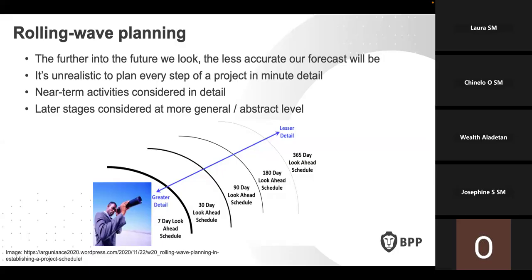So when you have this rolling wave plan, which you may not call it this, you definitely have these plans. Because while you are busy running your product backlog, everything within your product backlog already states the tasks that you'll be doing for the next 3 months. Although you've not picked them yet, they are there. So there's a look ahead. But you just don't have all the details for them yet. So that's your rolling wave planning.